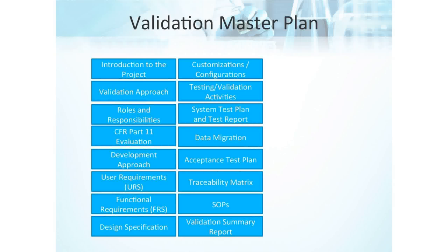But yeah, I've been on some projects where there have been terabytes of data that you need to move in increments, and so they actually had a separate data migration plan to make sure that it all moved over. So not unlike the system test plan, the validation plan would say you're going to have a separate data migration plan. Yeah. And in a way, it was treated like its own little project. Right. I'm sure it has its own timelines and its own roles and responsibilities. Right. And on very big projects, you can have a system go live with one stream of data. Then say you're incorporating another business unit. That would be another phase of the project, but you're just implementing another data migration activity, a different way to execute it. Right.